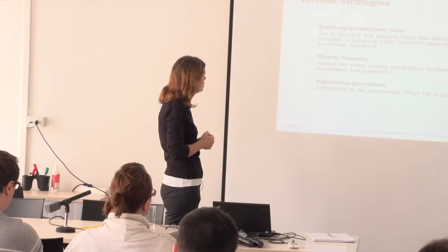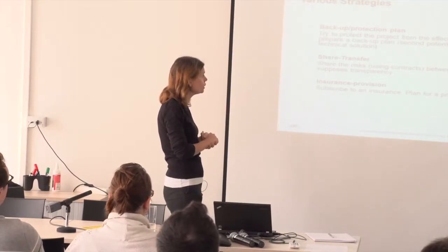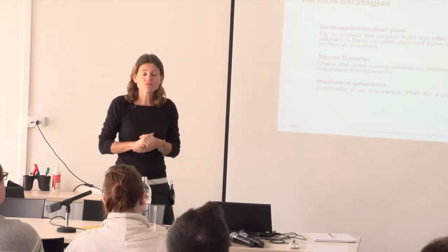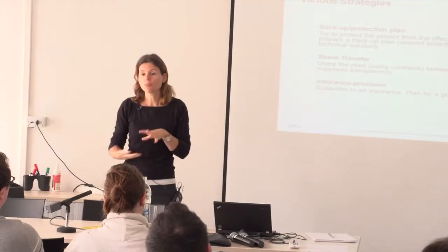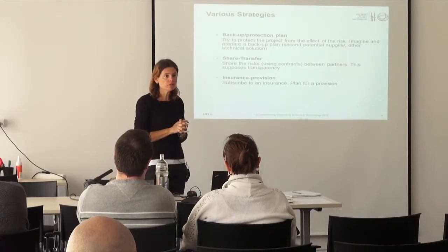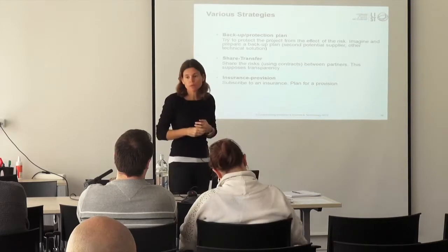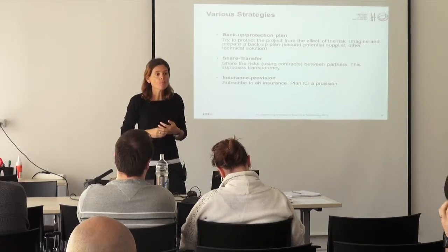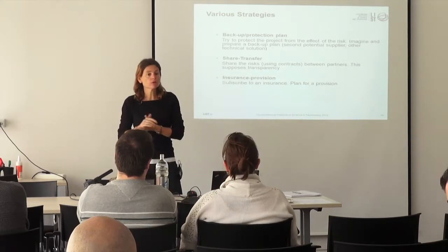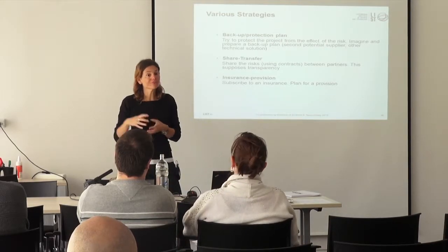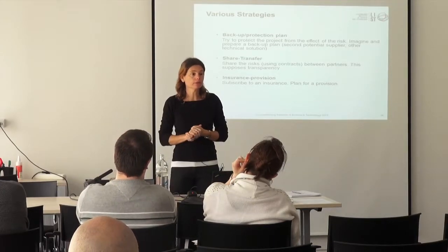That's one solution. So we talked about sharing, transferring, so trying to identify who could support the risk with you instead of you alone. And then insurance, anytime you can have some insurance, or provisioning, so having a certain amount of money or time ready for things that you had not planned.